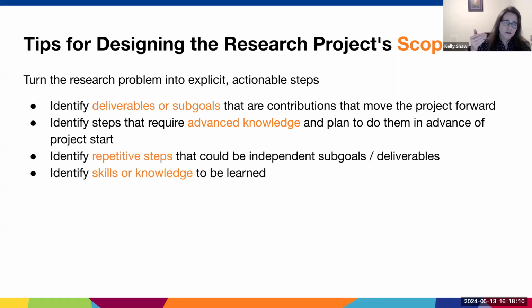So now we need to take that and turn that into those actionable steps, those frequent milestones that we were talking about. So you want to identify deliverables or sub-goals that are contributions that move the research project forward, right? As we were just talking about on the last slide, you want to have those milestones that are going to move the project forward. Once you have those, you want to identify any steps or deliverables that would require advanced knowledge by the student or skills that the student could not learn quickly, and plan to do those in advance